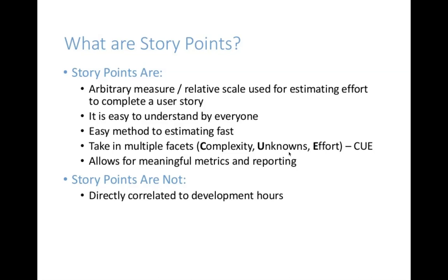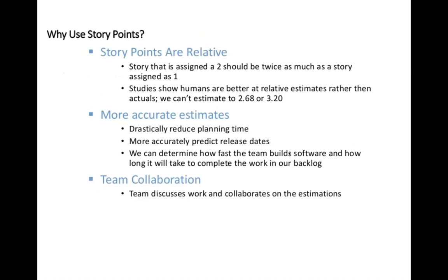Basically, these story points are not directly correlated to the development hours. In the current scenario, most of the companies are doing story points and they just correlate the story points with the hours. That is kind of a wrong method, and it should not happen when we are providing the story points.